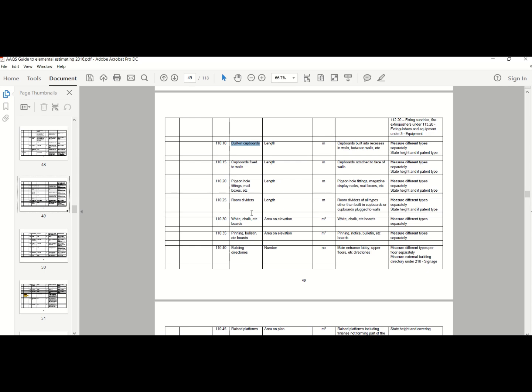You might even get the cost of cupboards from Lotus Pine, or Builders Market, or any place like that. You might get an idea or feel of cupboards, and you try and take that rate, add the installation cost, the labor cost, the margin of profit. You just make an allowance there. You can use your discretion on that. I'm not going to mark those items too strictly. The main thing is that it should be in the ballpark, more or less.